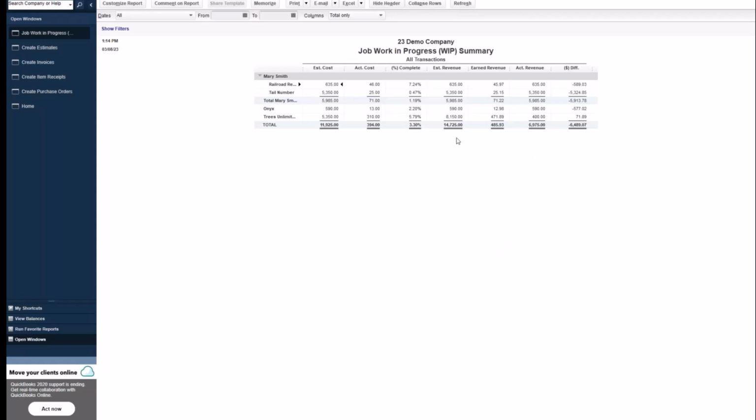So continuing with this same example, we have our estimated cost is now at 5%. Our estimated revenue, you will see right away that now we don't have $93 over unders, now it's 71, right? We haven't invoiced anymore, we don't have any more costs, but our estimates drive this percentage, and it makes a big difference.